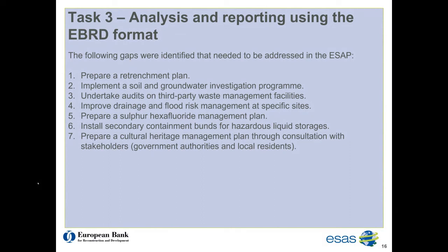Now EBRD's Environmental and Social Policy Framework, PR2 paragraph 20, contains some very specific requirements associated with collective dismissals. These include, for example, the analysis of alternatives, the preparation of a clear and transparent selection process, the use of a grievance mechanism, and for all outstanding back pay and social security benefits and pension payments to be provided, amongst others.